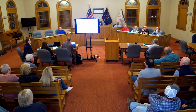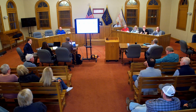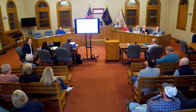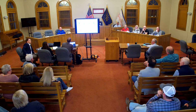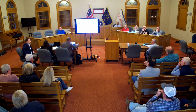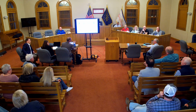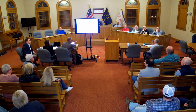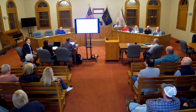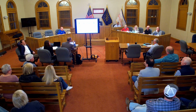But what would your estimation be for a renovation where you don't know what's behind everything? It's obviously going to be higher. And the other thing to remember about that 15%, what Andy is referring to, is that it includes both a design contingency, for things that are evolving between a conversation like the one tonight and when we're ready to send drawings out for bid, like Gary was describing, and also a construction piece. The design piece is kind of the same regardless, because it has to do with the decisions that this body is making. The construction contingency is obviously going to be higher on a renovation building because you're going to start running into more things. The new addition, and even more so a new building, is going to be low.